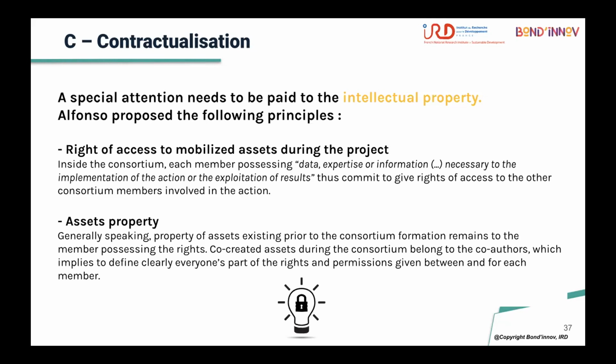And also asset property can be discussed, but generally speaking, the property of assets existing prior to the consortium remains with the member possessing these rights. But the assets that are co-created during the implementation of the project belong to the group.